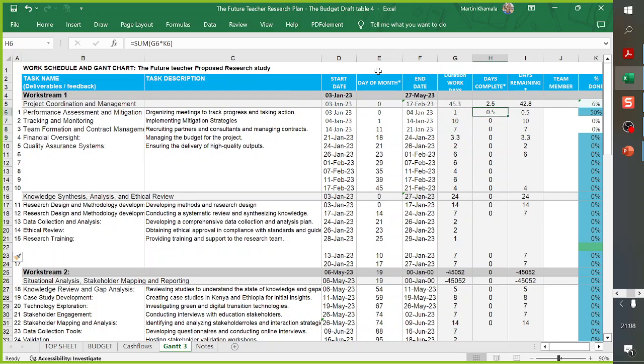I'll leave a column here just for you to put the number of days for your activity. Because if you see it happening for months, you just calculate the days. It can be 70 days if that's the activity. But I'll leave a column for that because the Gantt chart automatically generates from what we type in as the number of days. So that will be good. It's only for our purpose.